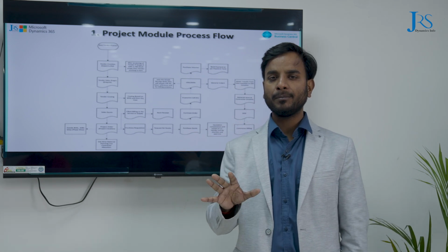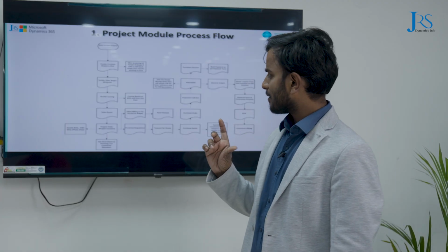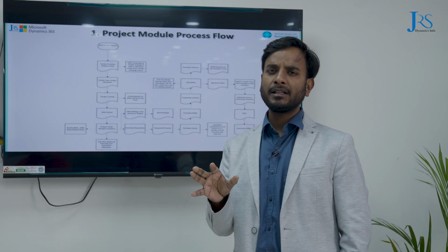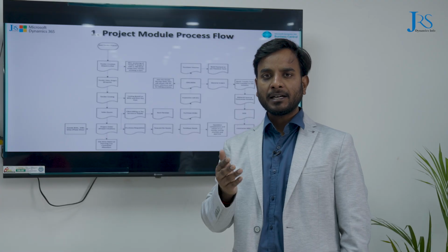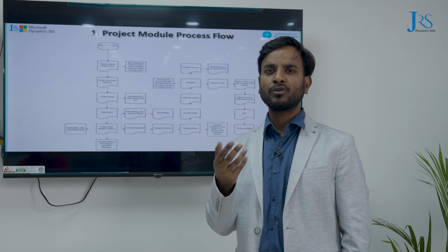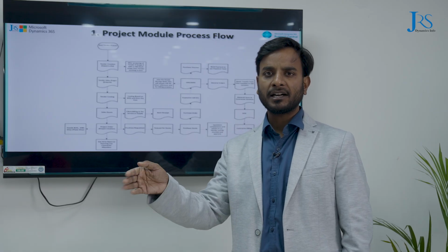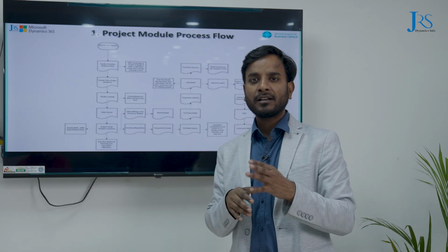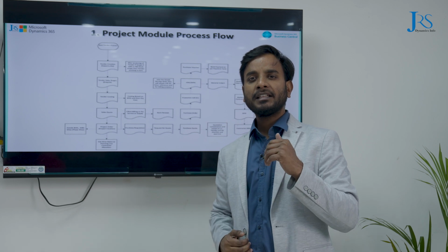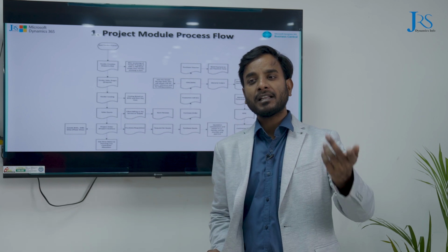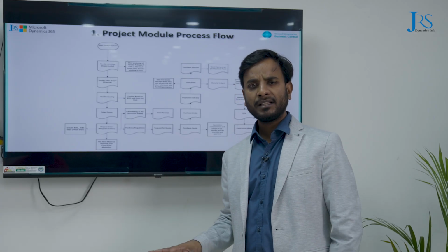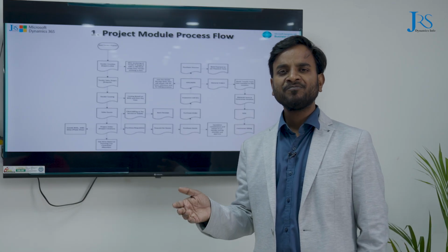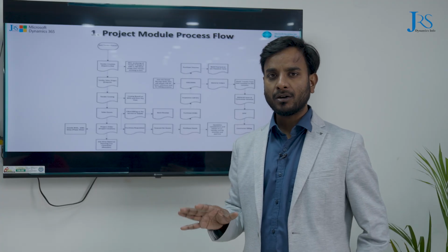So quality is a place where we can handle everything within a system. We have developed everything so that they can check the stages. For example, for a purchase order of 100 pieces, they indicate that 50 are ready and you can start the quality check. The supplier also records the raw material quality, the in-process quality, and then the finished goods quality, which is available on the vendor side also. Everything related to quality is available, as we have developed for one of our customers, and based on that we can achieve the quality part.